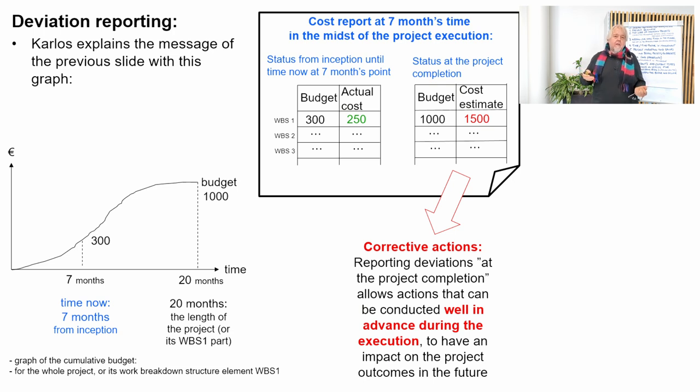And I have this kind of an example. So if we are planning and building in our project a motorboat, a very special, very fast motorboat with two external outboard motors, let's say. Now that we see that our cost estimate is so high and we must reduce the cost radically, we must just take the drawings and specifications of that boat on the table and strike the other motor away and only make a boat with one motor.